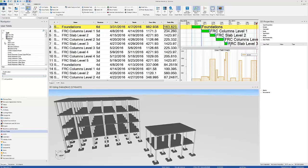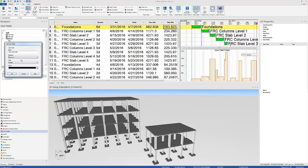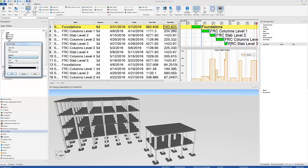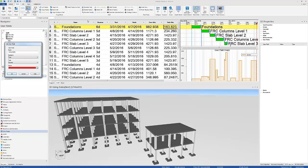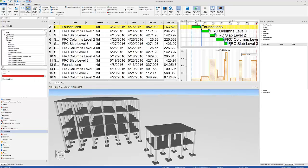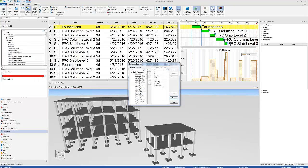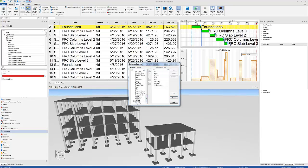Now, to take this a step further, I can create a new task user field. Again, this is going to be a task user field. It's going to be a number, and call it actual quantity. Let's give it the color red. Let's load this on our Gantt chart by customize. Again, I could have done all these steps from the start, created three user fields, three colors, and loaded them all, but I want to show you the progress.